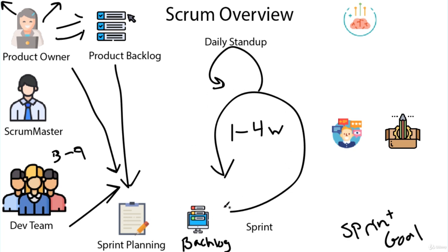How do you choose who works on what? That's the magic here. And this is why it's important to have full stack or really developed, or at least just developers with different expertise. The developer team gets to choose what they work on. They all look at the list and they're like, well, I'm going to begin working on this. I'm going to begin working on that. And you just start your development process. So the sprint planning creates the sprint backlog.